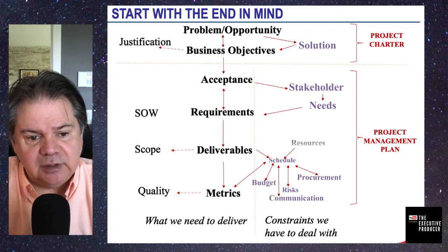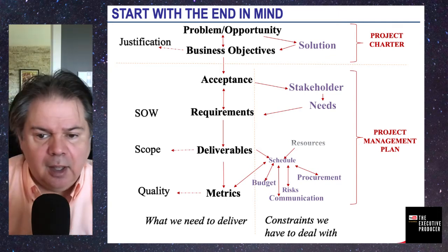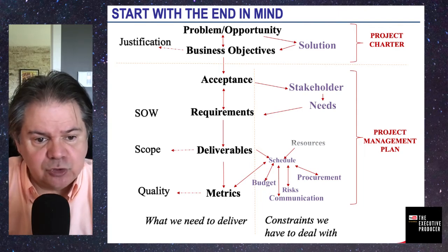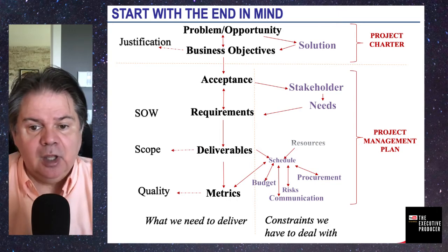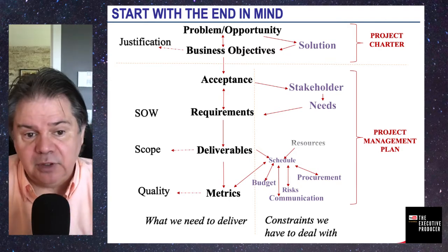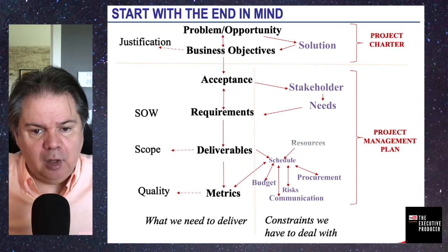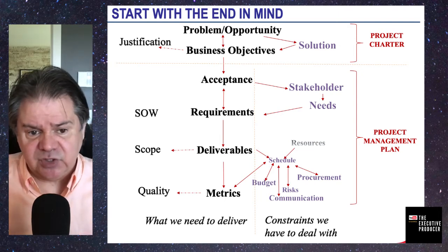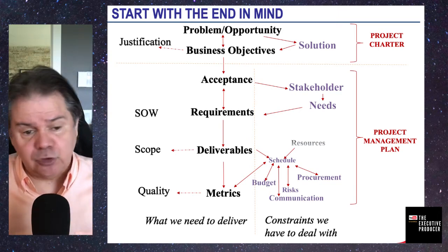Now I need to put it into the budget, which is going to give me a time phase budget, and the time phase budget will be the cumulative of all these resources used over the variable of duration in a certain case, or over the variable of effort if it's people, and that's how we're going to have this time phase cumulative S-curve built. So the development of the budget is a direct result of combining the unit cost of the resource versus the effort or the duration in certain cases.